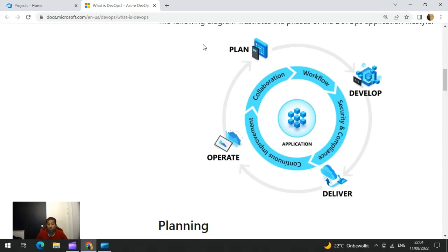And of course, frequent cross-team collaboration meetings are also really helpful so that there are no roadblocks. Just in case any roadblocks are there, you'll be able to clear them as well. And also, the most important thing is you should stop asynchronous communication tasks. For example, if someone is reaching you via chat or email and trying to make it a priority, just simply stop. You're not supposed to take it because it has to come through your planning, and only then, based on the availability of resources, it needs to be given. So that's the best way to start taking up the agile methodology so that you can prioritize your tasks.